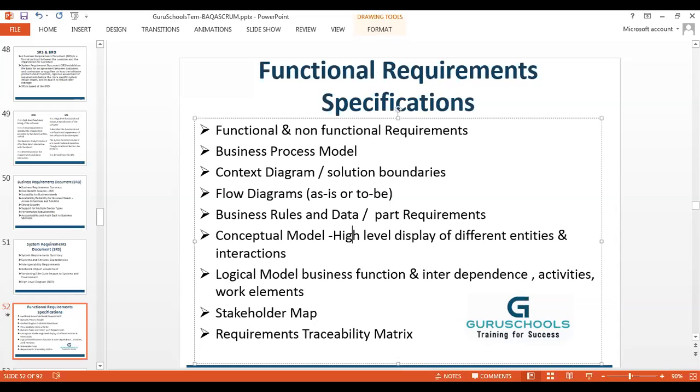So these auditory proofs are basically the evidence for whatever research you do, and you have to push this auditory proof into a separate folder called audit trace. That's the normal label of the folder as far as Infosys and Patni go. This label could change. It could be called evidence. Okay, so these facts or documents are verified whenever there's an audit. There are normally process audits or progress audits, and the auditors who are going to do audits will go to that folder and check whatever documents are uploaded. Again, one thing: whatever you upload to the cloud is labeled as created or updated by you. Okay, and that's how they can make their trace.